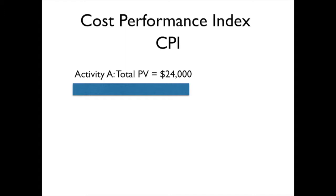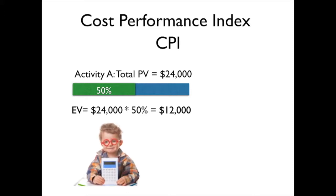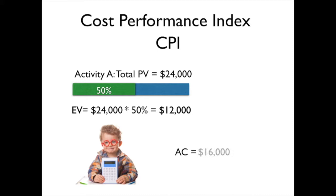Let's look at an example. Here I have an activity where the total plan value is $24,000. 50% of that activity is complete, so we'll take $24,000 times 50% and get $12,000 as our earned value. In order to get our actual costs, we're going to go to our accountant, and our friendly accountant is going to tell us that our actual costs so far are $16,000 on this particular activity.